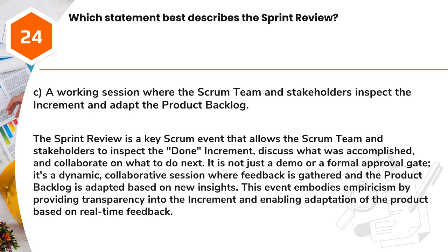Answer. C. A working session where the Scrum team and stakeholders inspect the increment and adapt the product backlog. The sprint review is a key Scrum event that allows the Scrum team and stakeholders to inspect the done increment, discuss what was accomplished, and collaborate on what to do next.